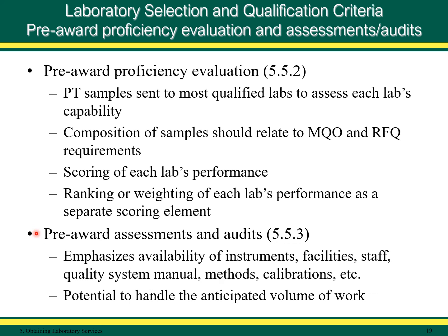Pre-award assessments and audits are addressed in MARLAP Section 5.5.3. The RFP should indicate that the laboratories with the highest combined scores for technical proposals and proficiency samples may be given an on-site audit.